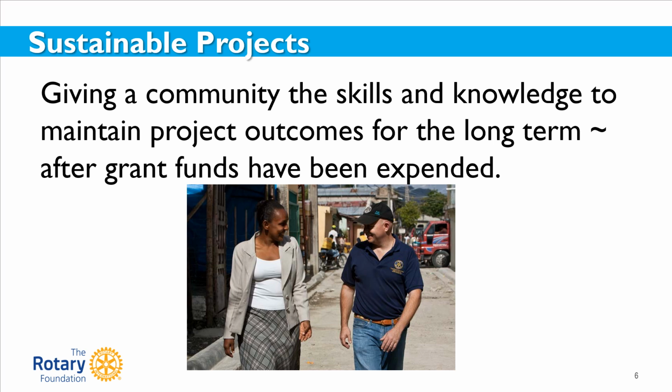The project should strengthen beneficiaries' knowledge and skill through education and training, and project partners should collaborate with local organizations to supply expertise. Project partners should identify individuals within the community impacted by the project who will be willing to assume leadership roles for sustaining project outcomes. Also, clear and measurable project objectives should be developed and a method for collecting data established. Figures will, ideally, demonstrate change for at least 3 years.